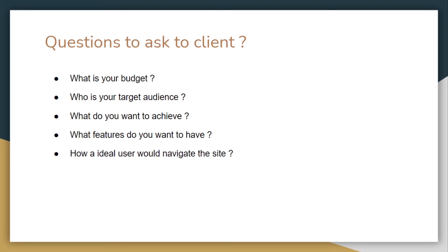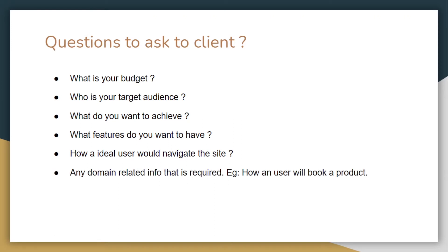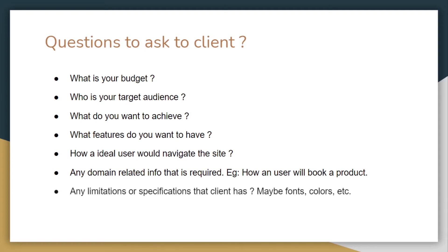Next we will ask about the features they want on the website, which will be used by both designers and developers. Then we will ask about navigation — how they want a user to interact with the website so we can make it easy to navigate. After this, we will ask for any domain-related information. For an e-commerce site, we will ask about the product journey or how the user will book a product. Finally, we will ask about any limitations or specifications such as fonts, colors, or screen size.